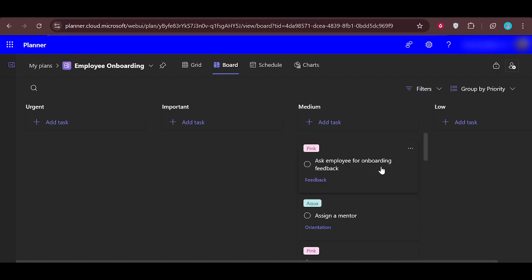If you were expecting to see the critical path but only saw priorities instead, clearing the group by priority setting is usually the key step. After that, make sure you're in a view like Gantt chart and that critical tasks are set to be displayed. In many setups, this is already the default, so once you remove the priority grouping, the critical path becomes much clearer.